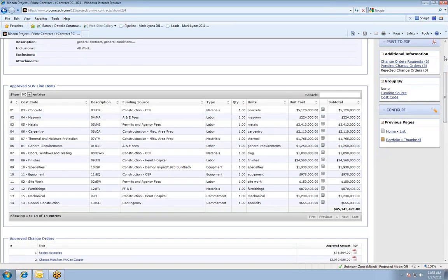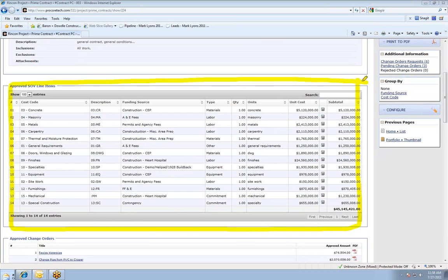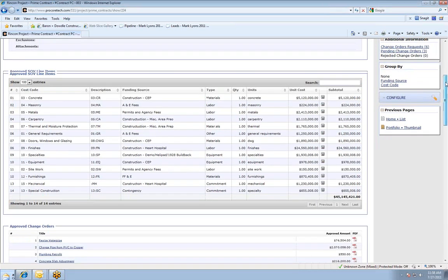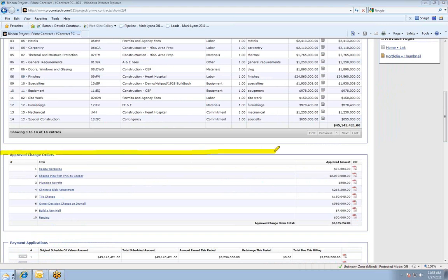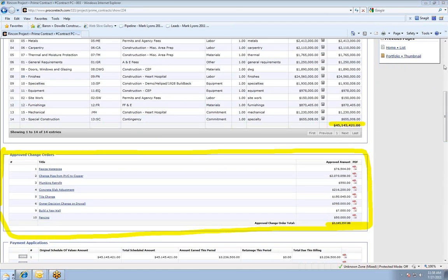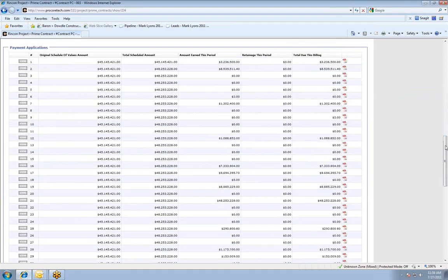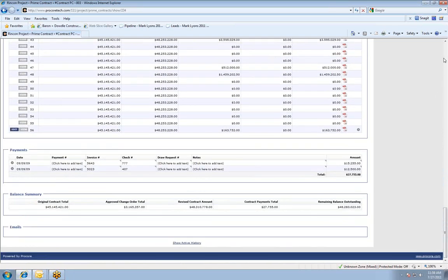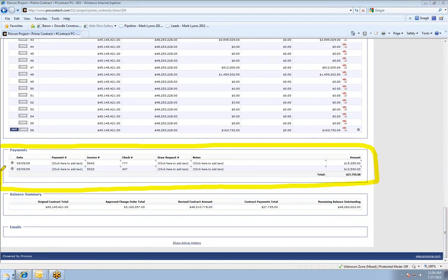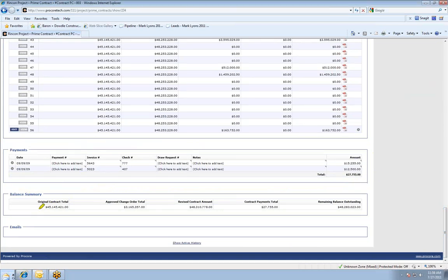If I scroll down, we're looking at the schedule of values for this $45 million project. Right below that, you'll notice any change orders that have been sent upstream to this prime contract and approved — I've got about $3 million in change orders, so we're sitting at about a $48 million project. Below the change order information, Procore has a pay application feature that spits out the G702-703 payment request to the client. Payments can also be documented right here. At the very bottom is the balance summary, showing the original contract amount, approved change orders, new contract amount, payments made on the job, and the remaining balance.